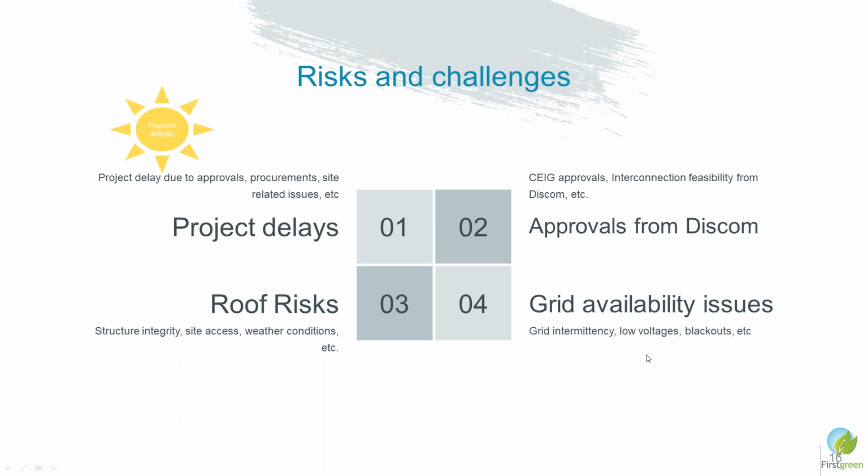If the client doesn't have adequate grid, or if the client has low voltage, it is the developer who faces the erosion of his profits because of less sale of electricity. Please ensure that these issues are addressed in your curtailment or deemed generation clauses of your PPA.